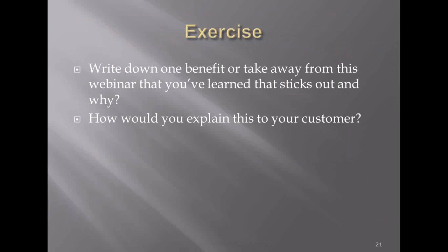The next question is, what are the lenders looking at when they're looking at the contractors? What kind of requirements do the contractors have to meet? There's no specific guideline within HUD that they publish on what to look for. They just want to make sure that the contractors are competent, that they are insured, that they're properly licensed based on any state or local requirements. And so each lender will have their own validation process for the contractor.